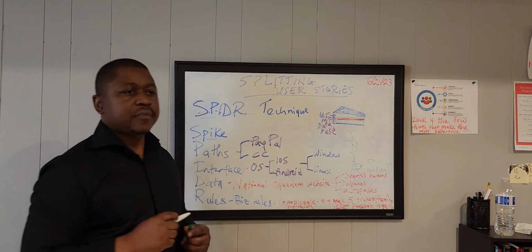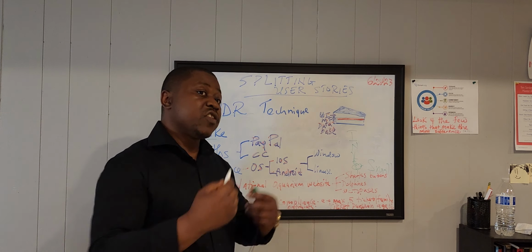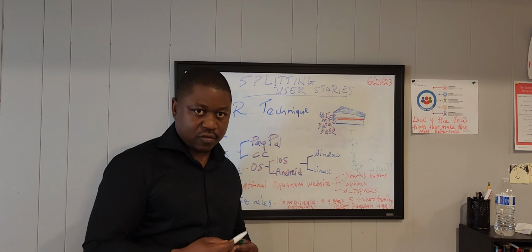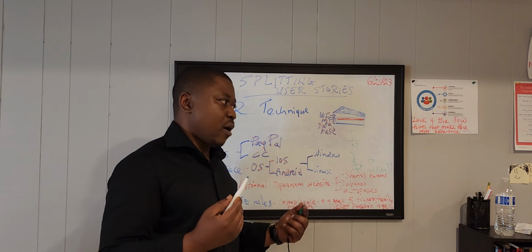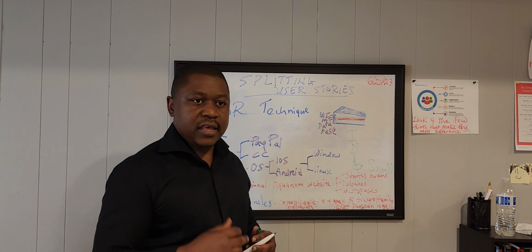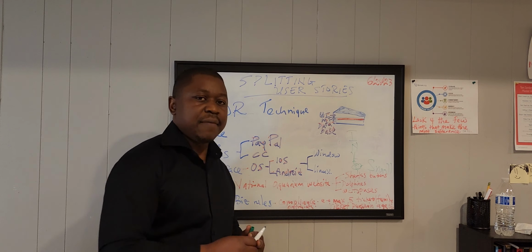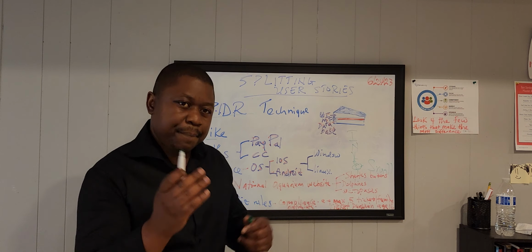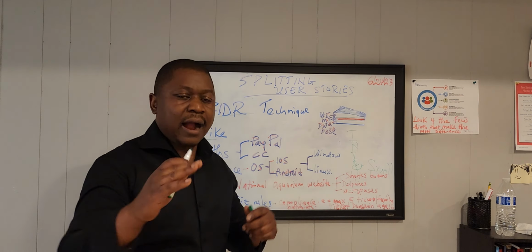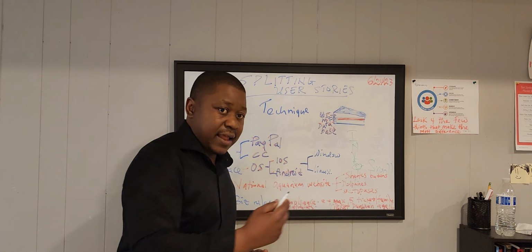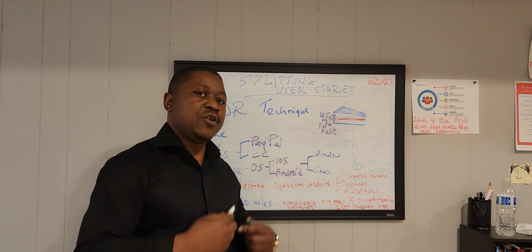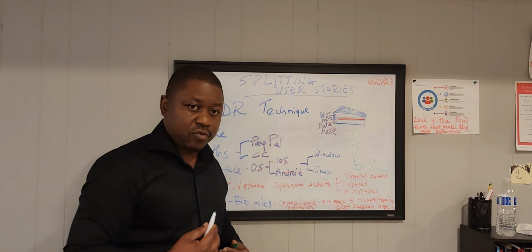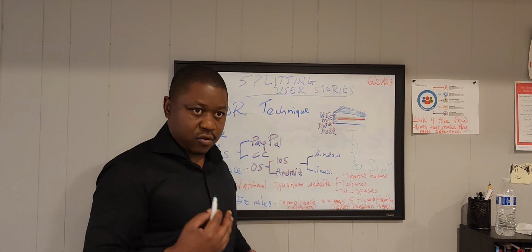So what's a spike? A spike is just mostly a research. Most of the time, the reason why we create spikes during our backlog refinement sessions, for example, is when there's a requirement that the PO brings up and the engineers are really struggling to make sense out of it. Maybe the design is not yet clearly defined, and there are probably several ideas around how they can go about actually implementing that user story. And probably they don't have enough information to actually flesh out that user story and get it ready so that it meets the definition of ready.